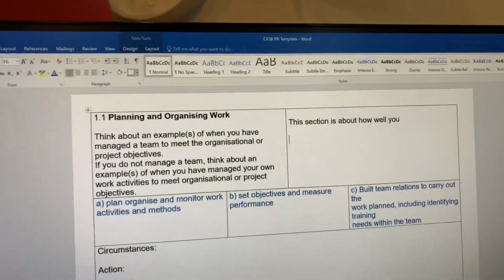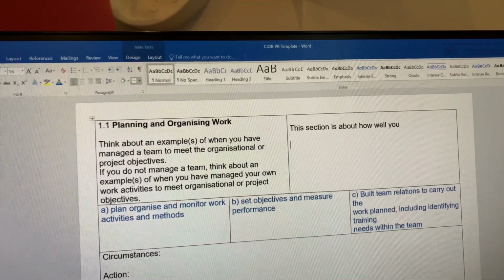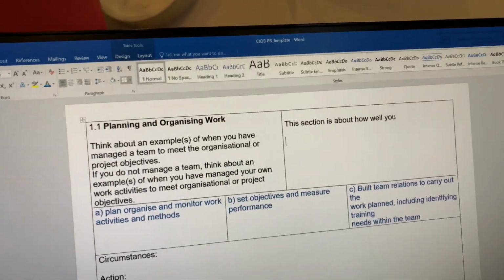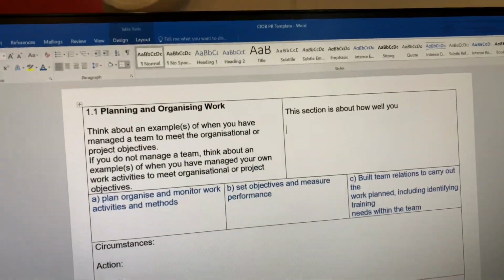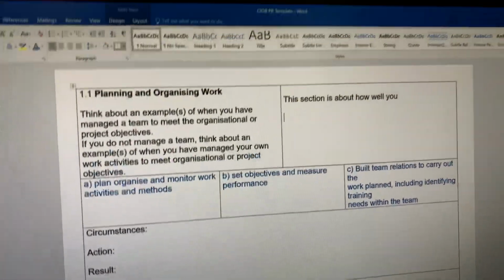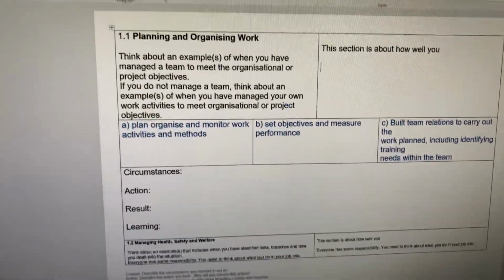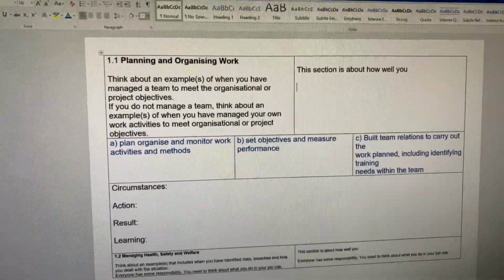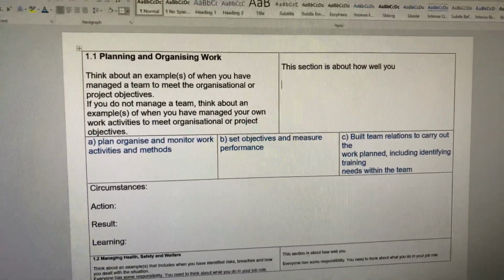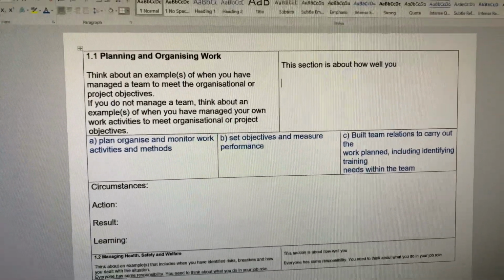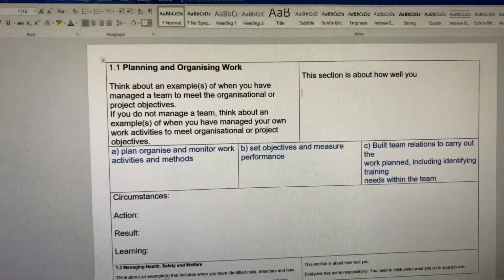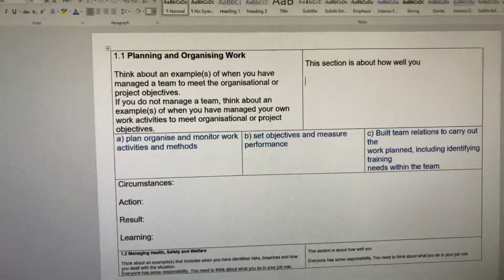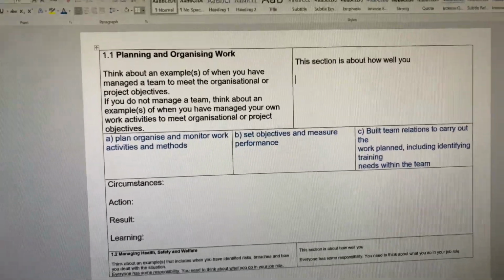materials. And right now with COVID-19, a lot of merchants have been closed down. So where some shops are open, there's quite a bit of traveling to be able to obtain these materials. And now the primary material that we need is PPE. So we need to be able to gain PPE and have discussions on how they will tackle going on site with vulnerable residents, clients. How will they carry out the work? What PPE will they have?